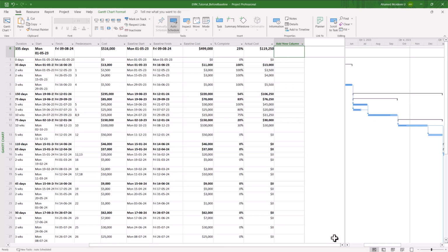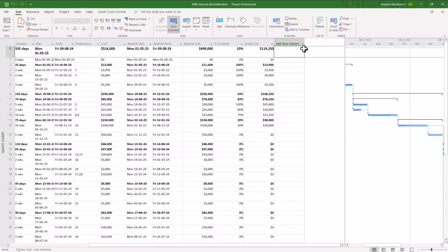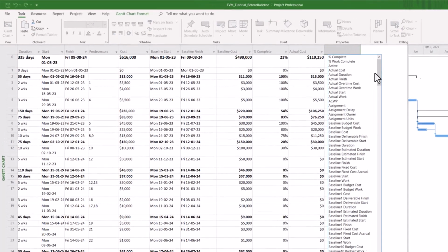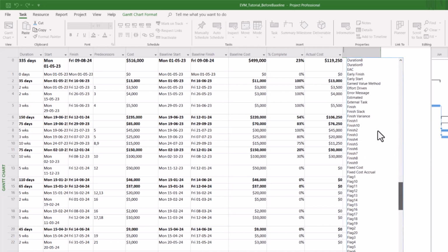And now it's time to run EVM analysis. So for this, first let's save the file. And you have 2 ways to see the earned value management metrics. You can add the columns you need directly here. For example, if you go to EVM, you see here you can find CV value, CPA value, cost variance. You see estimated completion. You just add these columns.